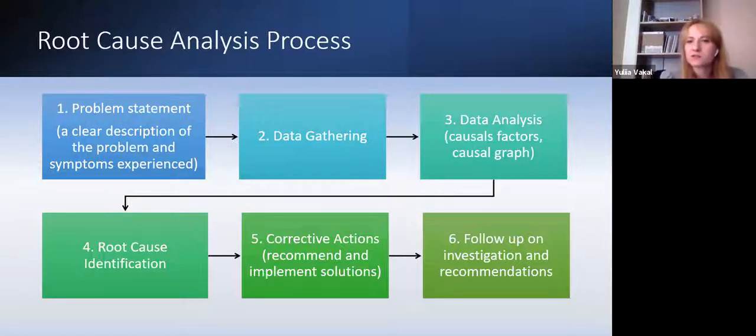And the last stage is follow-up investigation. If it happens that we thought we fixed the problem, and then it happens again, it means it wasn't the root cause. It means we found something else and we need to rethink and start again. Probably try a different technique or involve different people, because something was done incorrectly, something went wrong.